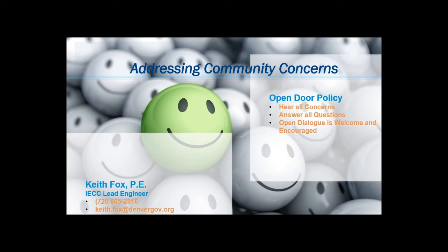Thanks, Christy. Keith, I've got another question for you. Where in the documents do you wish to have the checklist issued? I'm just wondering if that means where in the plan submittal documents should the checklist live? Okay, we're asking for the checklist and the energy modeling report to be submitted as separate PDF files. So they would just be included with the construction documents. They will not be located on the construction documents themselves. So just as a separate file to be submitted when you go through the login process.